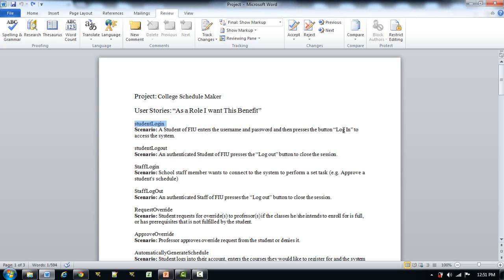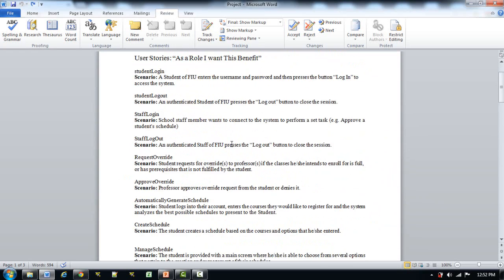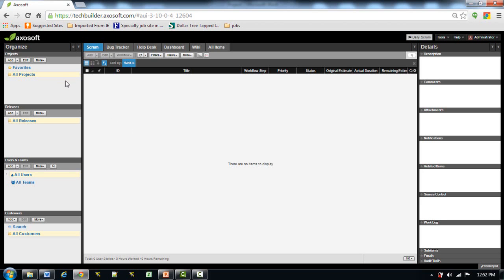For example, Student Login: the student of FIU enters the username and password and presses the login button to access the system. Here the role is student of FIU and the benefit is accessing the system. Then Student Logout: an authenticated student of FIU presses the logout button to close the session. Here the role is authenticated student of FIU and the benefit is closing the session. In a similar way, I have some user stories which I will be entering into the system.